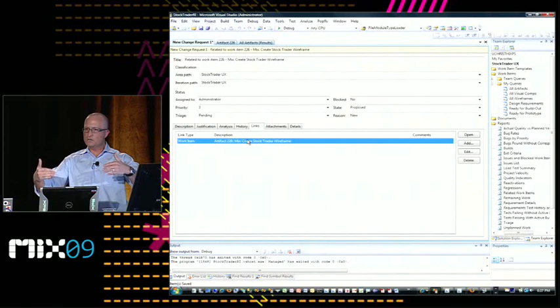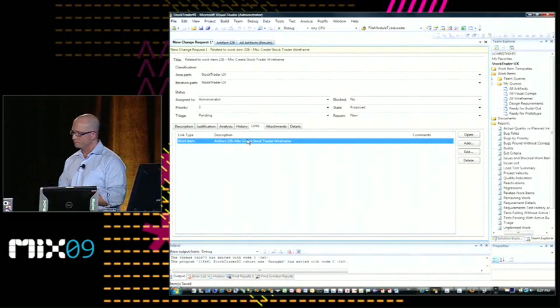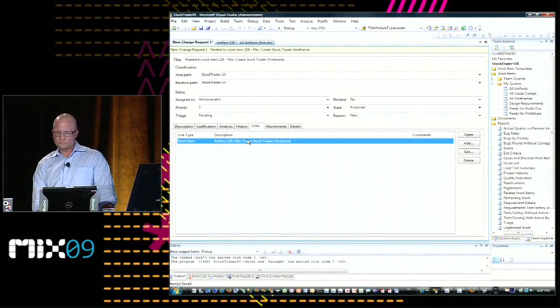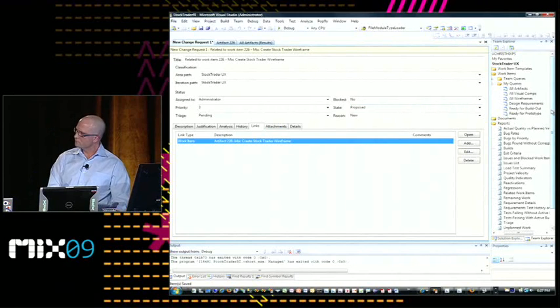Every task you do, everything you're completing, traces back to those requirements, and you can bubble those up into a report. As one example, this morning we built the whole app in Sketchflow, and we actually generated a document that had requirements. I could just take all those requirements and put them in here as requirements in the tool. Exactly. That we can use for a project. It's a full requirements management system.